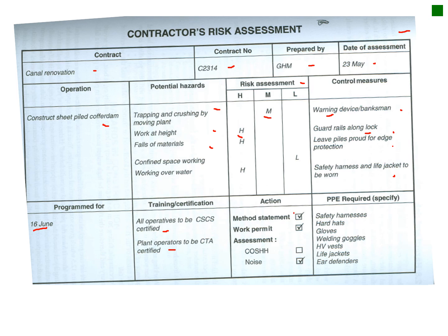Is the method statement done? Yes. Permit, for instance, if you have scaffolding, has it been signed off? Do you have the necessary permits to work in this area? Especially in the red zone of the mines, you need a permit to actually work there, and there are a lot of examples of that.